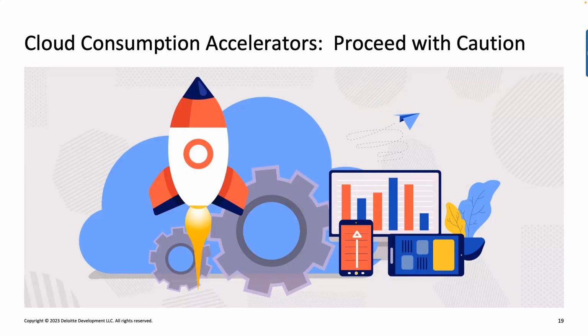I haven't seen any regulatory platform right now, and I've dealt with banks, healthcare, exchanges, government to a certain extent, I haven't seen that done in less than a year. Highly regulated type of platforms, right? For PII, lots of isolations and all of these things. So something to keep in mind as you go into the journey, right? Some people may have different requirements than others.